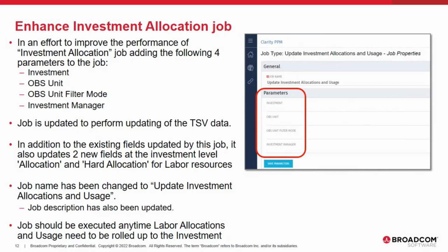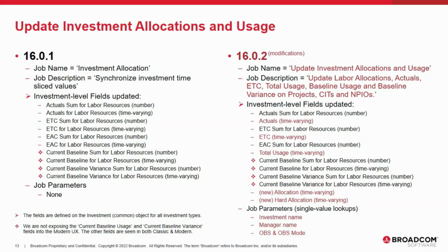The job should be executed anytime labor allocation and usage needs to be rolled up to the investment. The screen right now is displaying the additional fields that have been added to be updated by this job. So in 16.0.1, we would only update the list of fields that are defined right here. However, as you can see, starting 16.0.2, we've added the TSV data, and we've added the allocation and hard allocation TSV data.